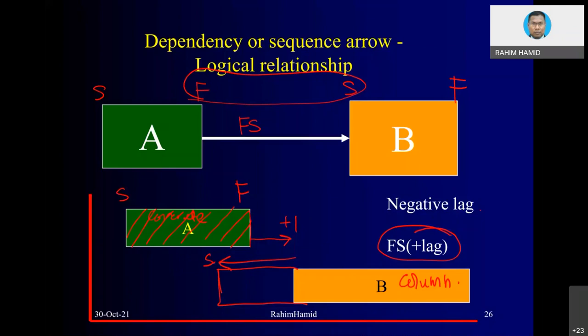Okay, if you do that, then basically you can cut short this period of completion of a column. Instead of just waiting for the whole span of the floor to be completed 100%, why don't you start the work at the beginning of the floor there, where it might not jeopardize your construction. This is what we normally do in cut and fill, where there are big pieces of land that we need to clear. We don't have to wait for the activities in sequence. So in such a way, you can cut short the activity completion.